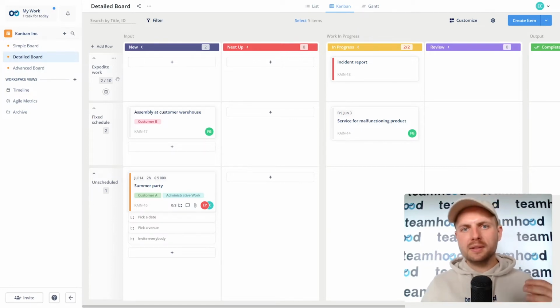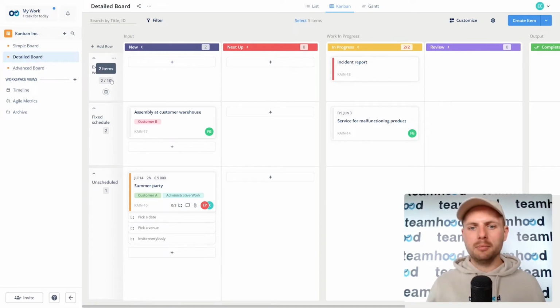And as this is top priority, we also want to ensure that we can deliver on those expectations by not having too much work in there. And I have a row limit, which is 10 items. If there is more, I need to do some process change. Maybe I need more people in the team, or I need to rethink our incident priorities or request priorities. That's very powerful, and you can model a lot of things with these kinds of limitations, so your process becomes not only visual but also guiding. It will be like a North Star to your team.